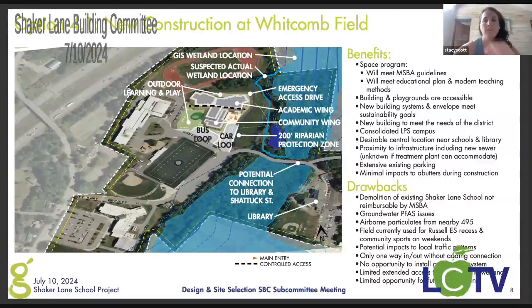Mike, is that kind of where you'd be, like a dollar per square foot? Union, it's like $7 to $10 a square foot just for the demo, and then the abatement can go anywhere. I don't think there's a lot of it here, so it shouldn't be a big number. But that's just the demo piece. Then you've got to think about all the site work. So it's probably $1 million, maybe a little less. Thank you. That's good to know.